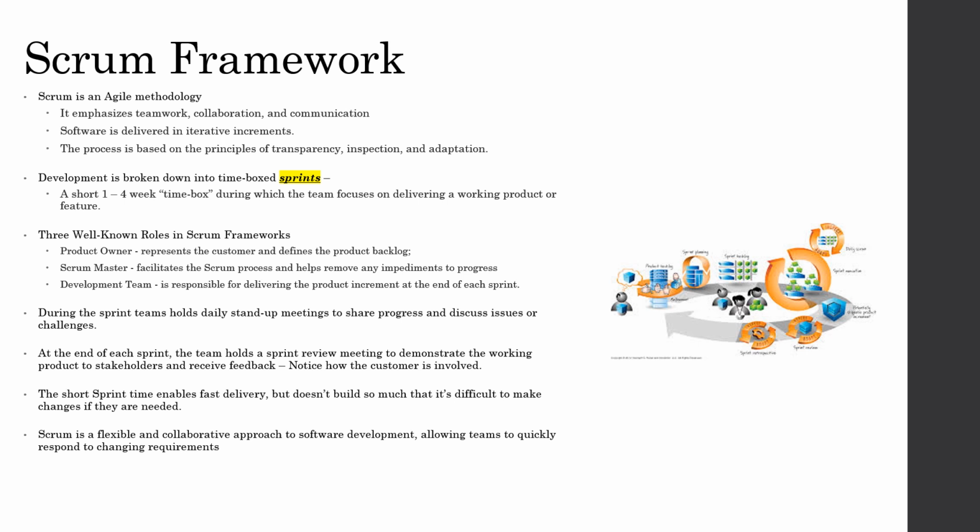And so within that meeting, nobody has time to sit down. We're just going to go into the meeting room. We'll stand around. We'll talk to each other very quickly, and then we'll move out. And so we have daily stand-up meetings that focus on immediate problems and immediate results. At the end of every sprint, now we will have a sprint review where we are going to look at how did this go, what didn't work well, what should we change in the next go, and the customer again. Once again, the customer's involved in that.